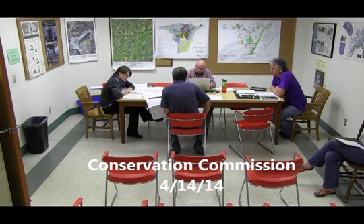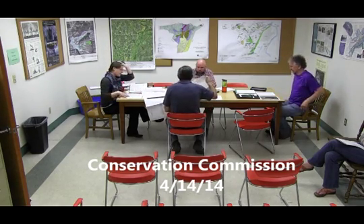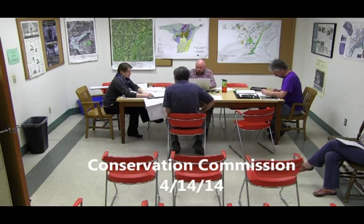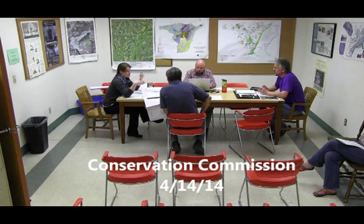Okay. So then I guess the only thing that I would ask you to provide as supplemental information to what you've already provided is a quantification of additional work outside the footprint of what was originally approved in the riverfront area. We're talking about square footage, because in order to properly document it on the form, we need to show the difference, so that it's properly ledgered.